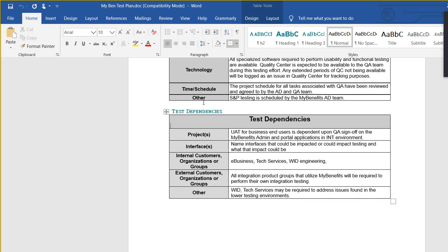Okay, guys, focus on this. User acceptance testing will happen once QA testing is done. Once the functionalities are tested by QA people and the bugs are fixed, when it is almost a finished product, then user acceptance testing happens. What do you do in the user acceptance testing? The actual business users test the application. Actual business people test the application, right? So this will happen. Dependency: QA testing will have to be done.